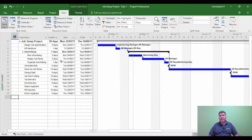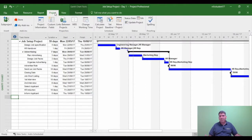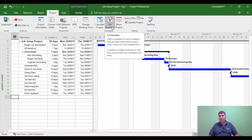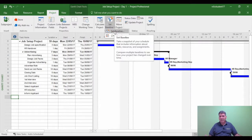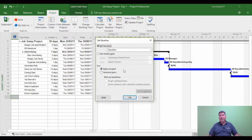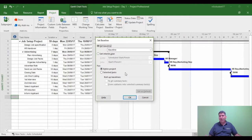To set a baseline, we then use the project tab. Under the schedule section of the ribbon, you'll see an icon called set baseline. Click the arrow, choose set baseline. Now within the box for set baseline, all we're going to do at this stage is use entire project. There are other options as the course develops.